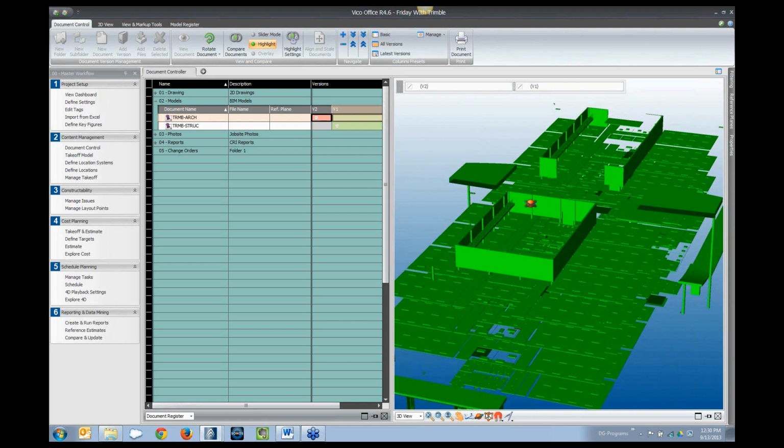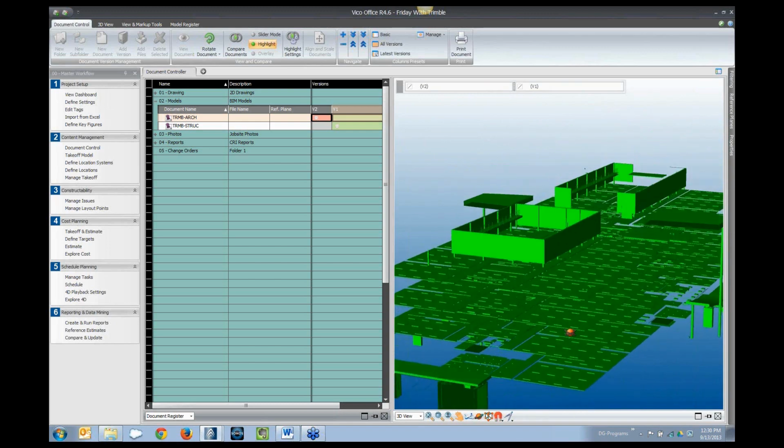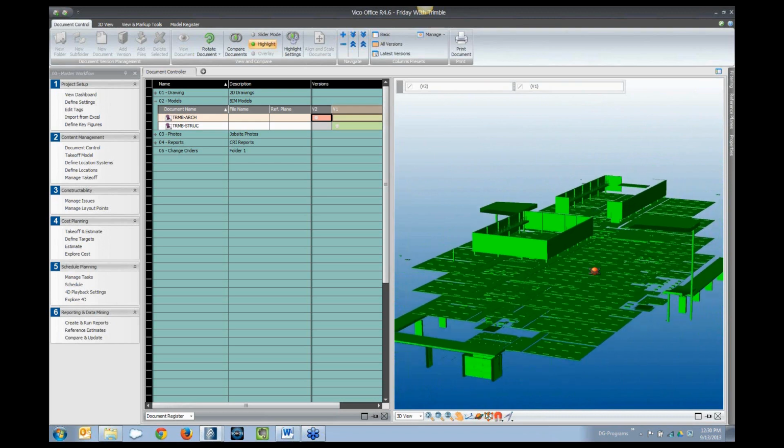So I'm going to want someone working on the facade estimate, and clearly there's been some interior work to finish the reflected ceilings and the layout of all the MEP fixtures that are going to go in there. So now I know right away what I want to tell my estimators to start working on so that the estimate can be updated with the model straight away.